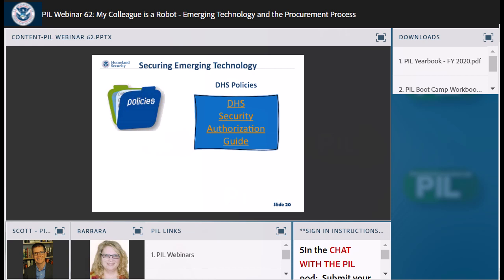Excellent. Now, one of the questions that people ask all the time is, when should I engage with, we've had that contact out there earlier, Rob Walther or yourself. When should I give you guys a call if I think I need an ATO? As soon as possible. Personally speaking, I would be contacting the security folks when you start the procurement process. If you know what you're going to be purchasing, then you need to contact your CISO office, or you need to get a hold of us, so that we're aware that there is an ATO that's going to be started on that purchase.